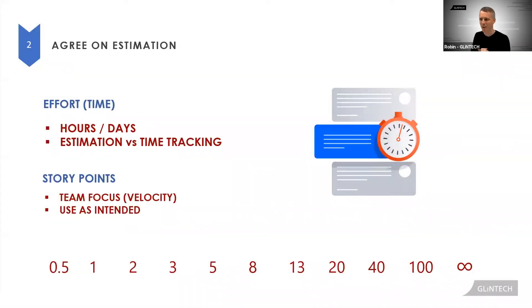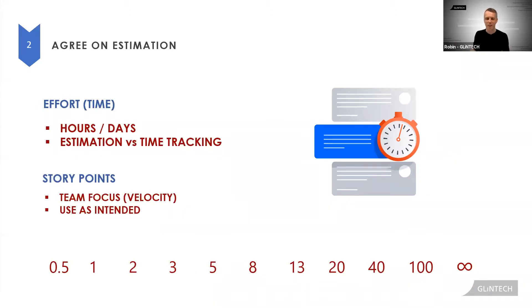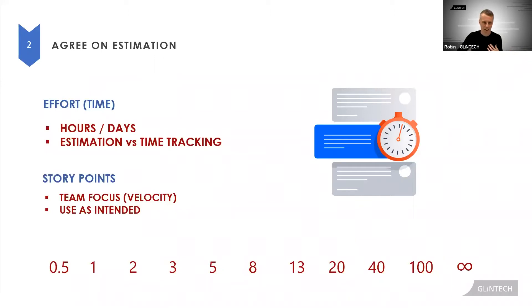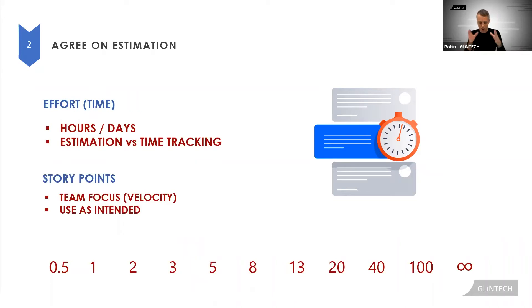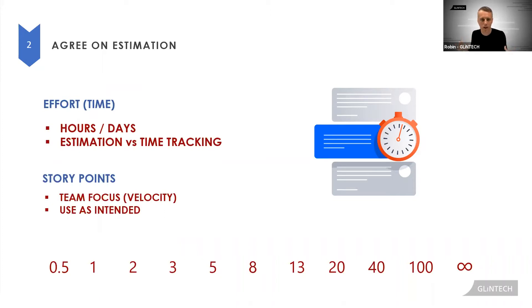The contentious world of estimation. This is the source of many arguments and I want everyone watching to know two things. One is you can't just ignore estimation. When you're doing planning, if you want to plan how long something will take, you need to estimate how big it is. There's no other way. It's not a JIRA thing, it's the basic maths.